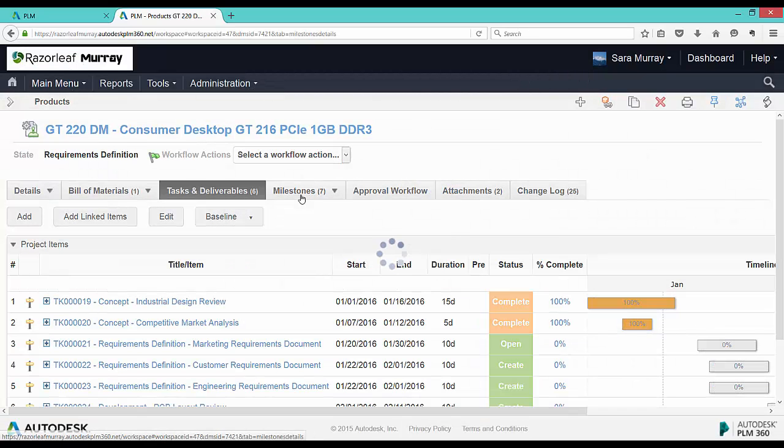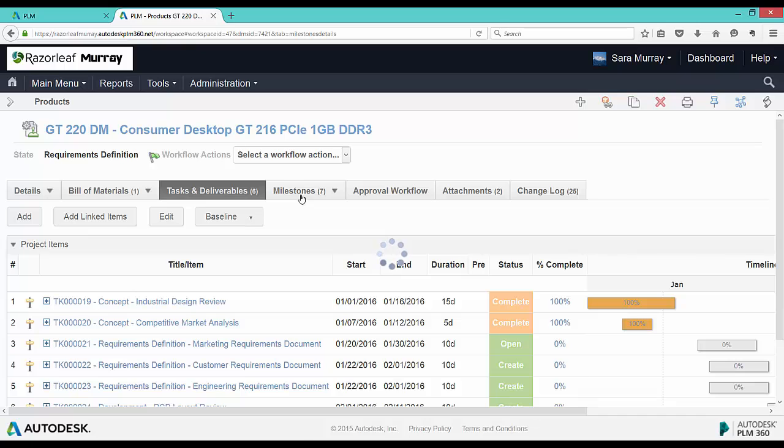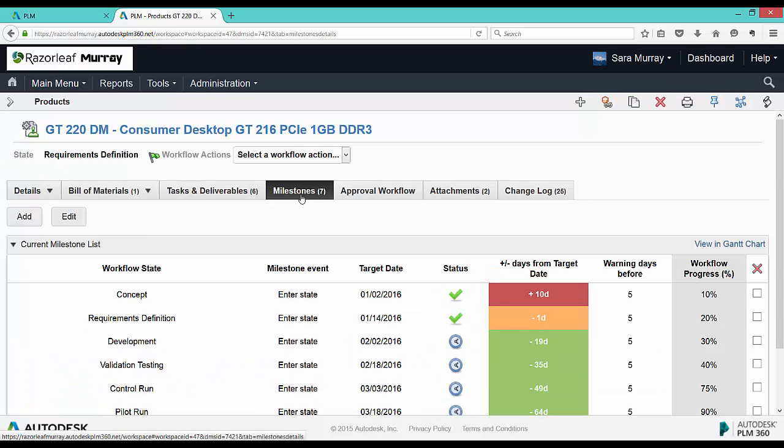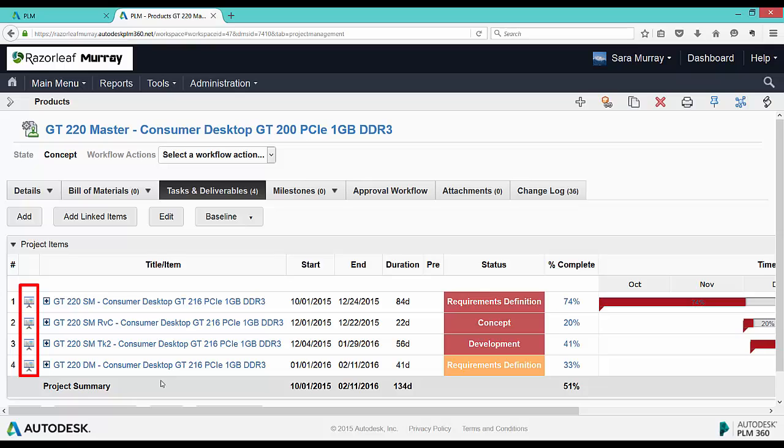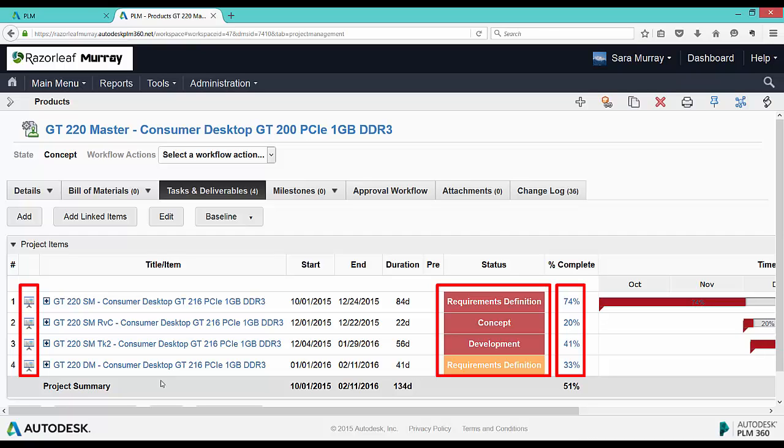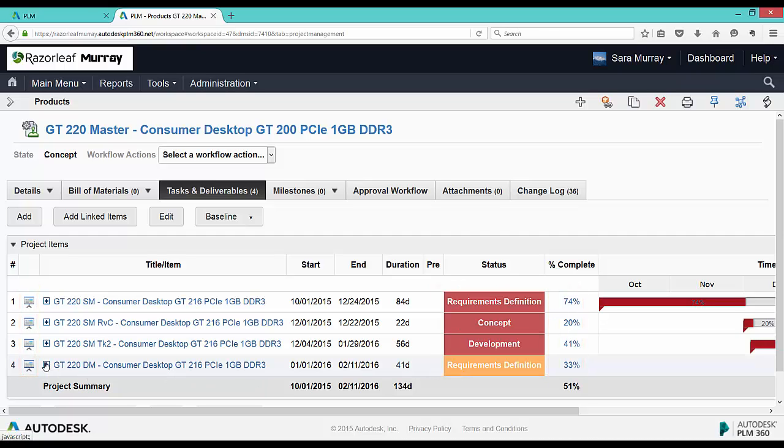Each product also has its own milestones tab for its workflow. So on this master project, we can also have a project management tab that brings in all the products. You can see in this case the project management icon, and again the percent complete, and the color coded warning about nearness to the target date for where the product is or was in its workflow.